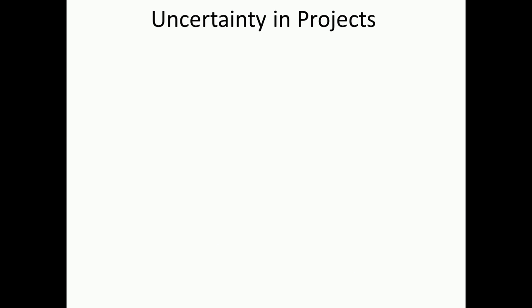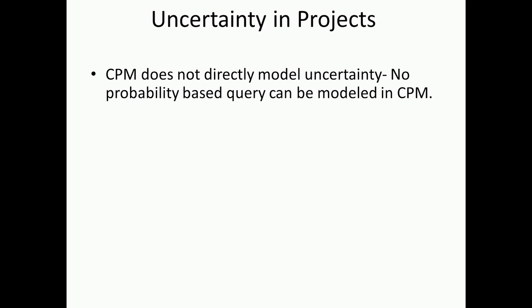Now, if we take uncertainty in projects, we have so far covered the critical path method, and as we are aware, it cannot actually model any probabilistic events. We do everything assuming that it is deterministic - the values for duration, there is no uncertainty involved. We are assuming that that is the duration that is going to happen and we go ahead with the plans. But we certainly realize in our control that that is not what is happening, and uncertainty is handled more in the monitoring and control part of CPM, but there is no direct way in which we can model uncertainty.